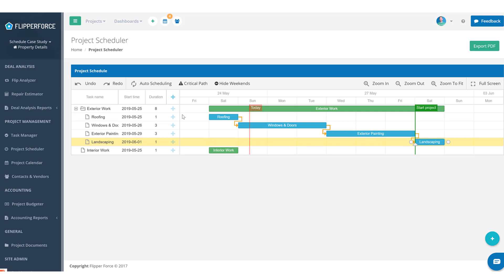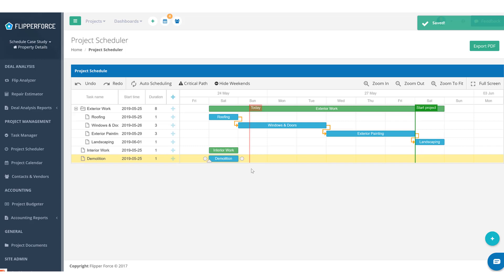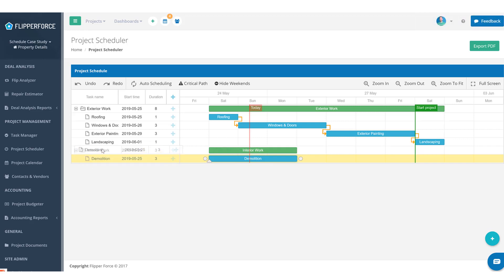Now let's move into the interior. The first thing you'll want to take care of is demolition. Demolition is probably going to take about two to three days — that's tearing out the kitchen, tearing out the bathrooms, tearing out all existing carpet, and maybe tearing out interior doors if you're replacing those. If there's a bunch of junk in the house you may want to add a couple of extra days. Let's plug in three days for demolition and drag it underneath interior work.